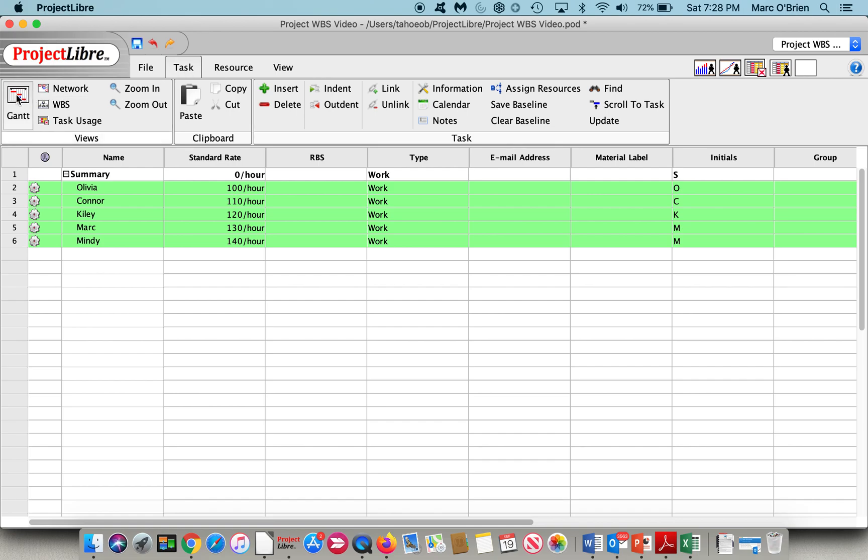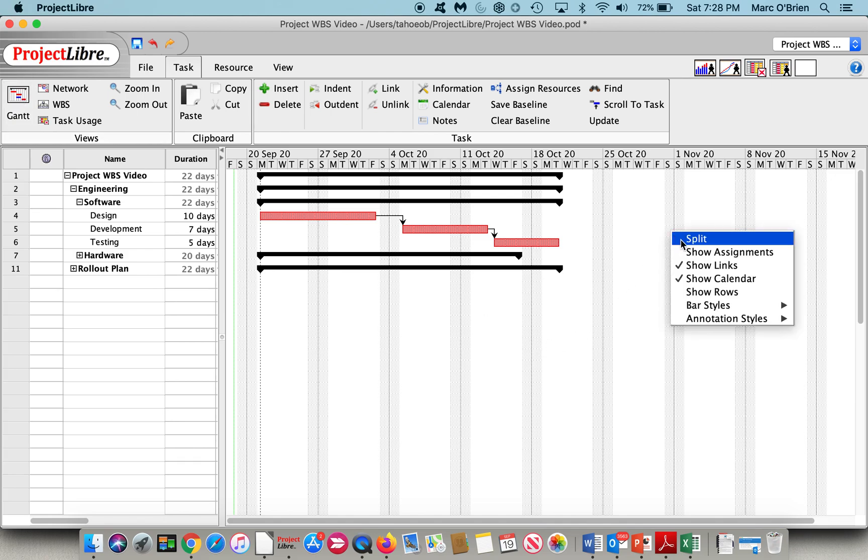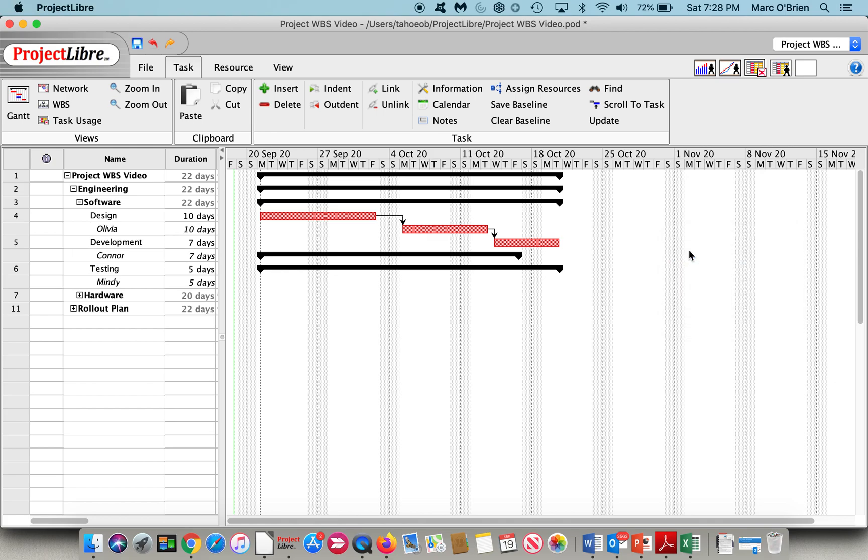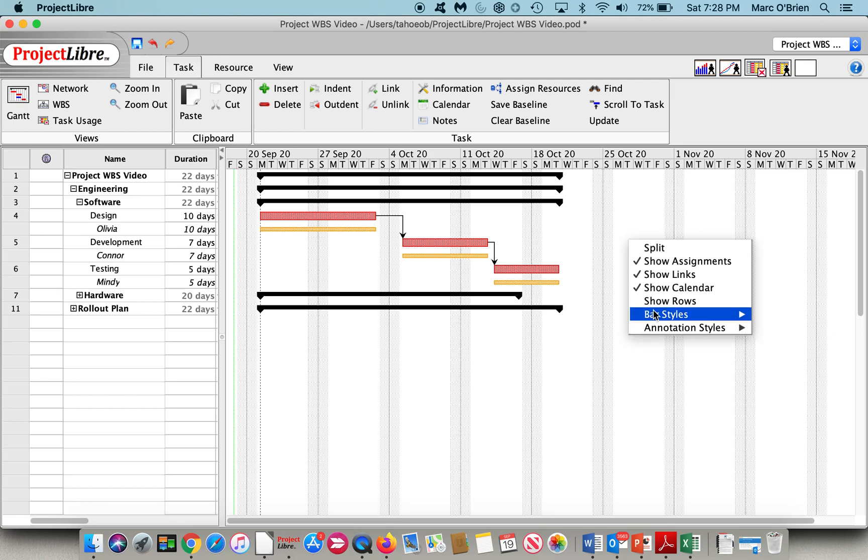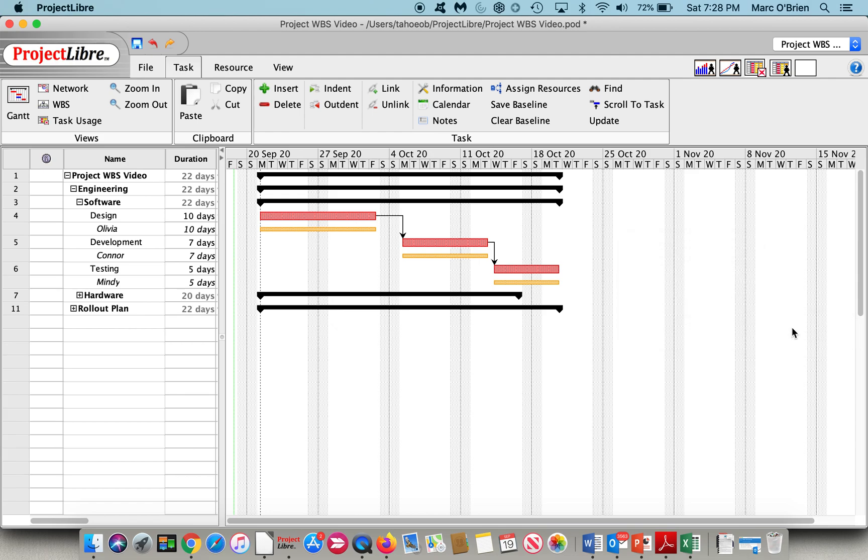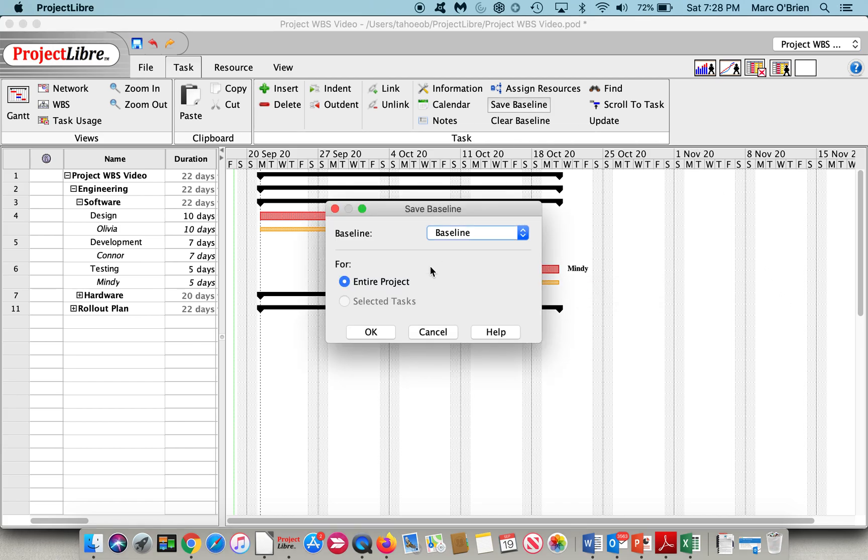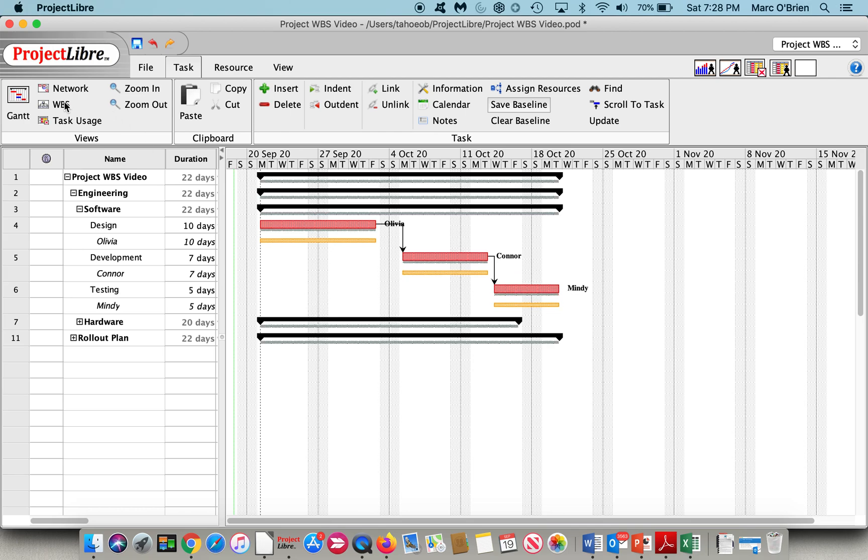If we go back over to the Gantt chart, you can see I've kept it compressed so that we can focus on this. If I right-click, I can show the assignments. I have assigned the tasks resources, but I didn't go through that. That's in another video, and we can actually annotate that, and we can show a normal. So on design, I've assigned Olivia. On development, I've assigned Connor. And on testing, I've assigned Mindy. And again, we can put a baseline in here, and that baseline, if we go back to the WBS, we now have our budget.